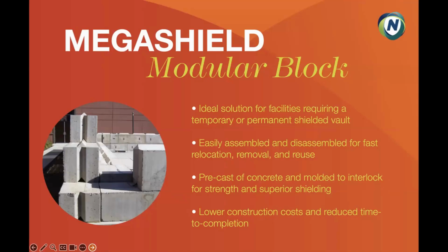So you're not waiting for your bunker to be built, your finishes to be complete, and your linac to be in before the first time that you are testing the materials. So it gives you real peace of mind that you know that this will be a bunker that is appropriate. Nelco have never had to do any work on a bunker that's already installed because it didn't meet the shielding requirements and it didn't meet the testing.